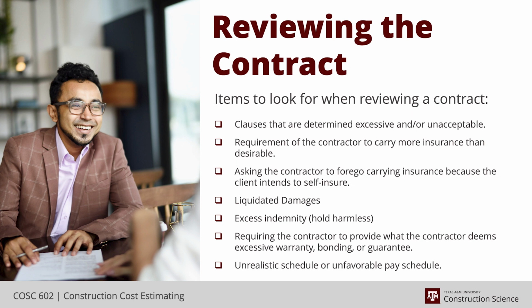A big one is liquidated damages. Maybe you have no choice but to sign up for liquidated damages, but can you negotiate a smaller value or different terms so it doesn't kick in on time? Maybe you can give yourself an extra couple of weeks before you start incurring liquidated damages.